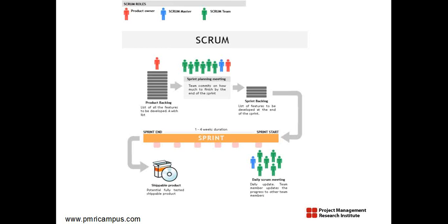So here we are talking about contract types for the Agile family. We cannot go after any one particular model under the Agile family. So this should be the contracting type. Fixed price will not work. Cost reimbursable may work. Time and material may work. Then the best is a value based contract. So that is the message.